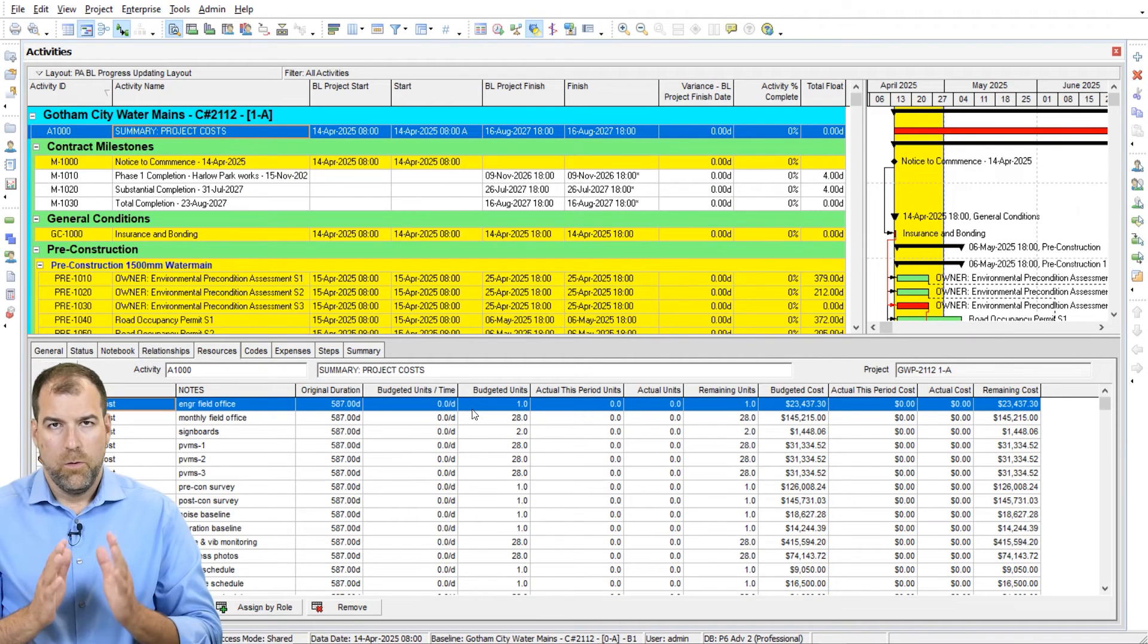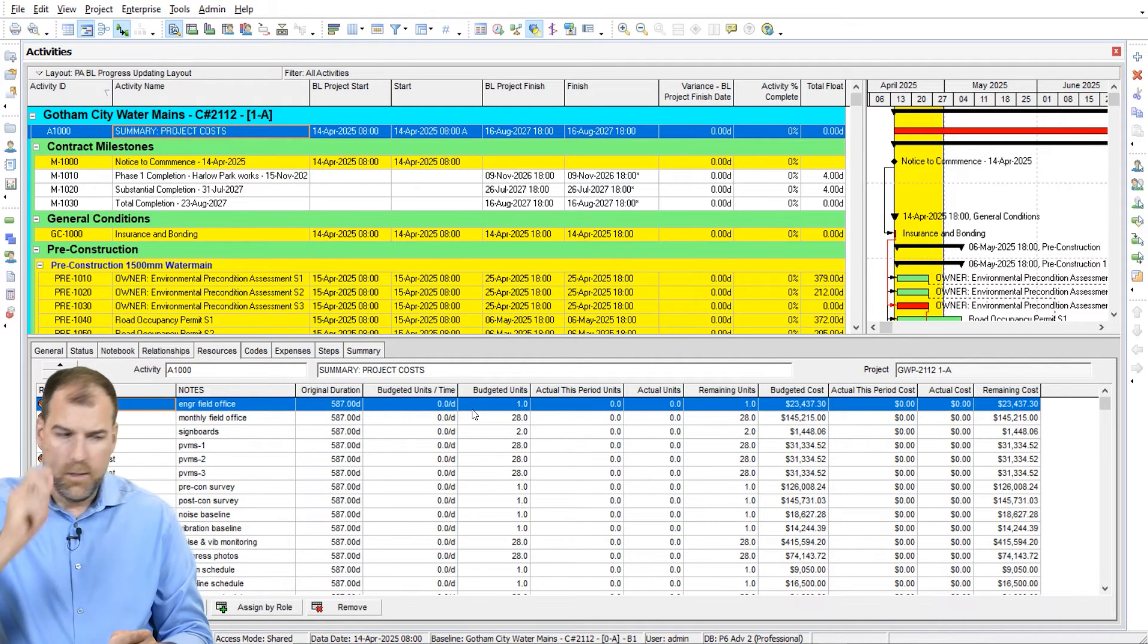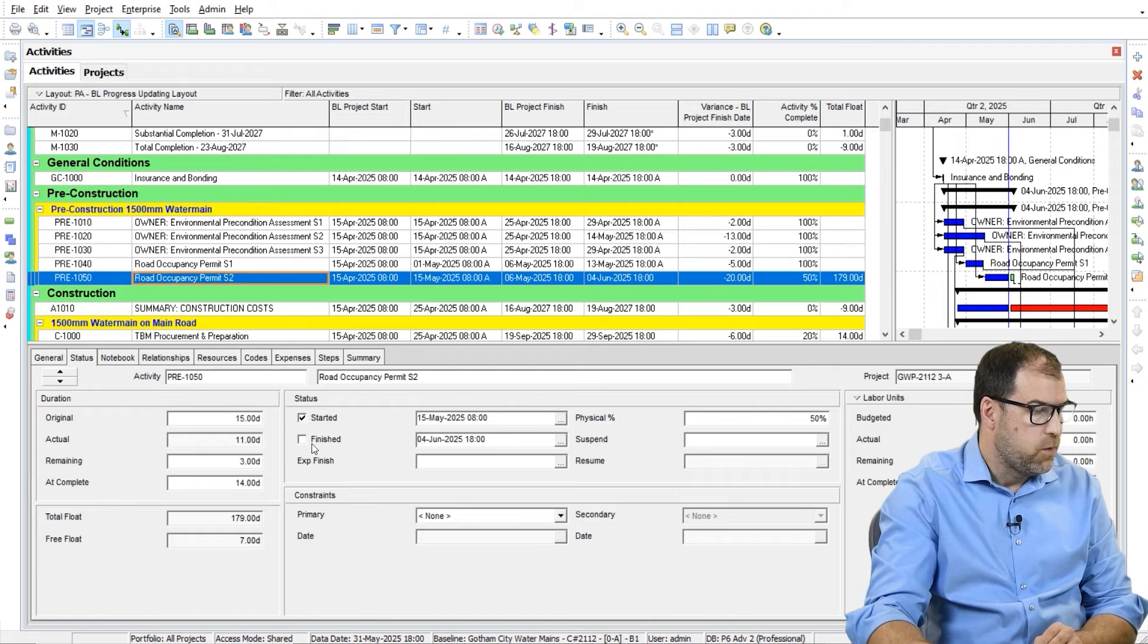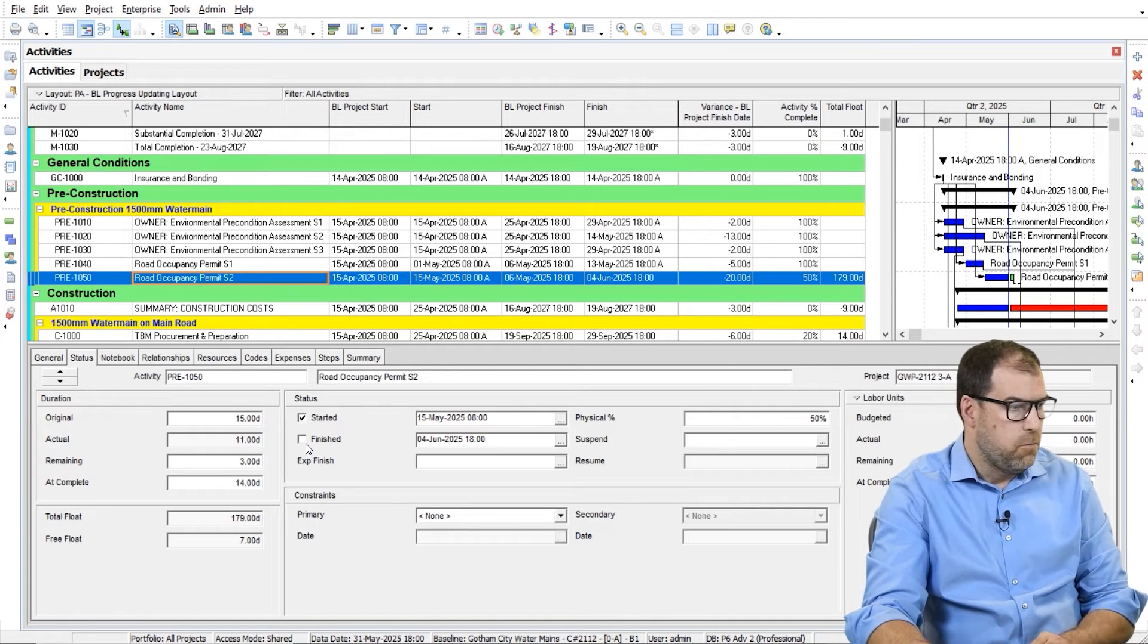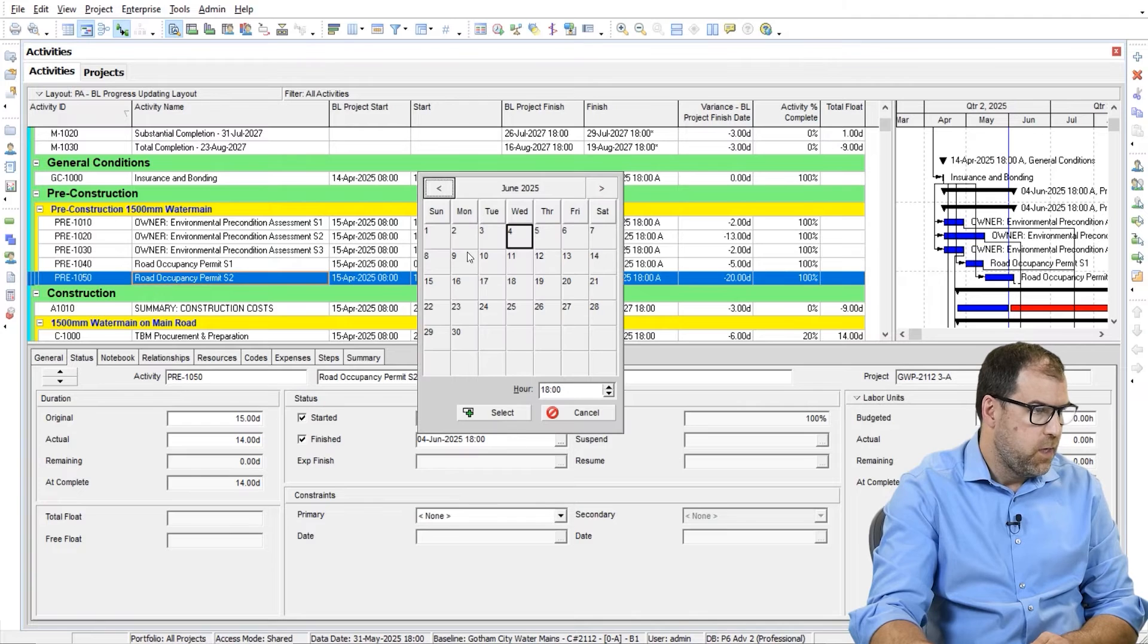This is where we're going to focus on Attention to Detail. I'm going to show you how we go through this. I need to put my glasses on. It finished June 13th. So to update that, we're going to mark it finished, and then we're going to change our finish date here to the 13th of June, making sure that the hour says 1,800.